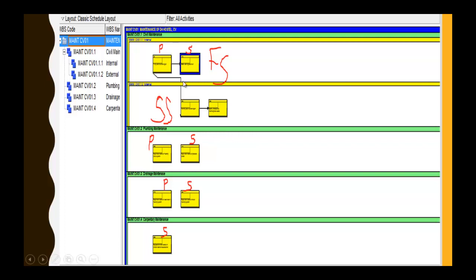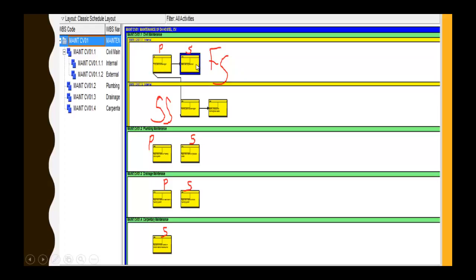To add predecessors and successors, you need to know what a predecessor and successor activity is. This path view shows the activity network. The first box is the predecessor — the activity that comes before the next activity. The next activity is called the successor. This activity type shown here is Finish to Start, meaning the predecessor activity must finish before the successor activity can start.